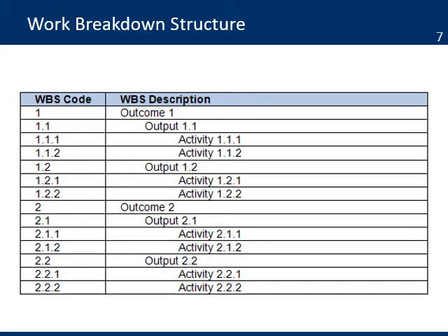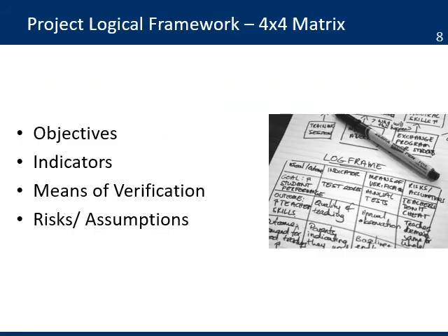The WBS can be presented in different formats. One format is to have the WBS codes and the description for each element. This is a useful format that you can develop using a spreadsheet. Note that each element of the WBS has a unique code. This helps avoid the duplication of elements in a WBS. This table will be the basis to develop the project schedule and the project budget.